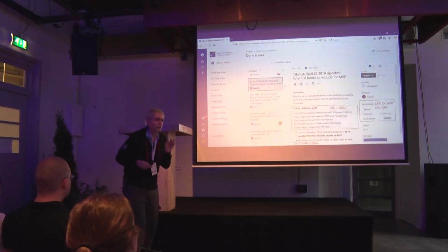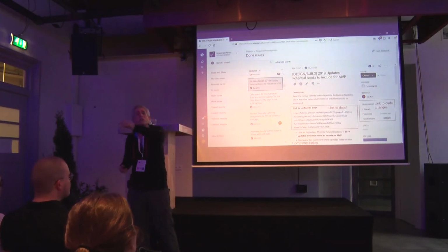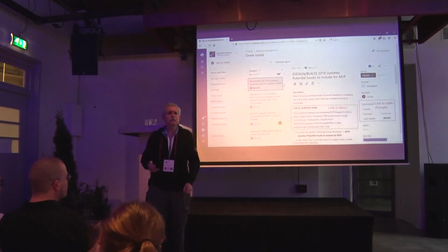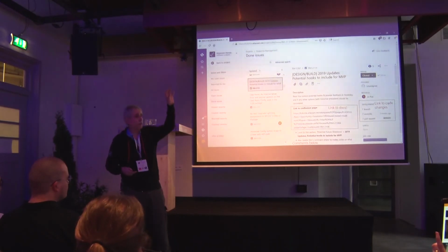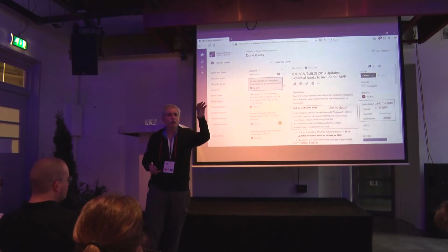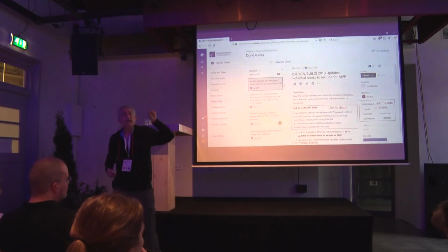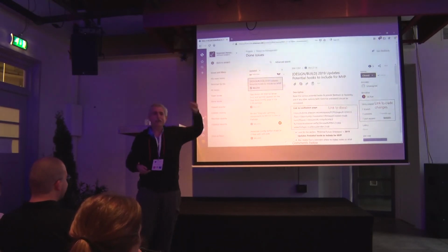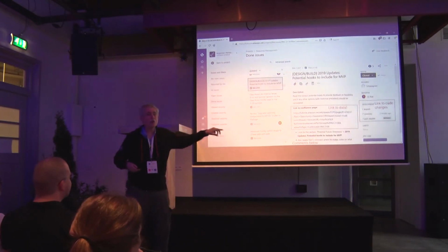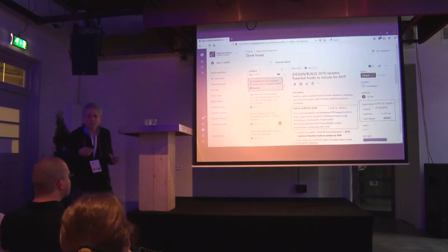But it's better than that, because it goes both ways, which means that 2 years from now, some new person can come in, and somebody says, well, you've got to change this workflow, and they'll look at the workflow, and they can see who created it, or who changed it last. And they can go and find exactly what commit that change was, and click the link, and go directly to here, where they can see the spec and the comments, and warnings. They can go back to the manager and say, well, I really shouldn't change that because 2 years ago you asked for this. And if I change that here, you're going to lose it. And the manager will say, oh, I didn't realize that. Let's rethink it. Think about the time and cost that comes from that.